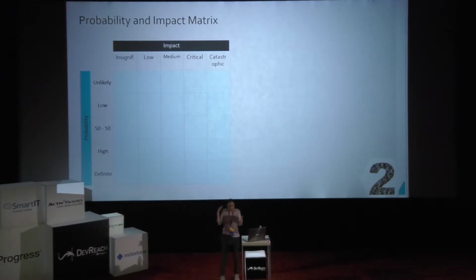Now that we have these scales, I just want to tell you that, again, you can use the template that is fine by your team. This is just what I'm suggesting. Even more, in practice, I don't use a 5x5 matrix. I use 3x3 because usually it's enough. So you can make your tailor-made templates for you and your team, and use it, and now we can fill it in.